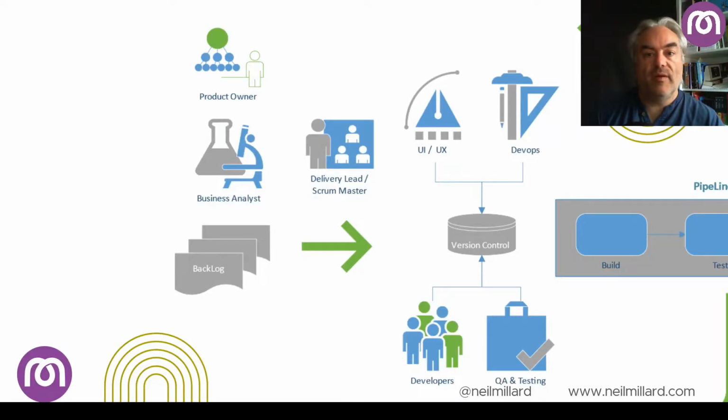The team will get together on quite a regular cadence and plan what the backlog looks like, sometimes breaking tasks into smaller ones so they can be achieved more easily. There may be a few iterations between the task creation and the estimation, and the refinement of that task with the product owner in order to get the tasks in a known set.